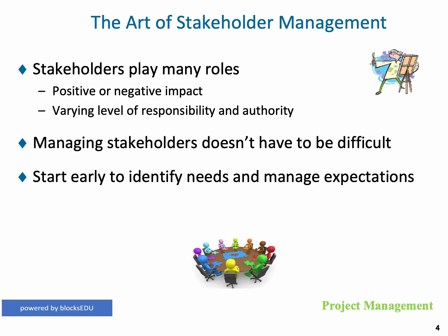That's strategy number 1. Strategy number 2 is to go to that individual, talk to them, have a sense of where they're coming from, get some sort of sense of who they are and all that sort of stuff. And at the very end of it, you say to them, what is the one thing that this project could do to bring you on board? And then you be quiet and wait for their answer. Do not interrupt. Do not tell them what it is. Wait until they give you an answer.